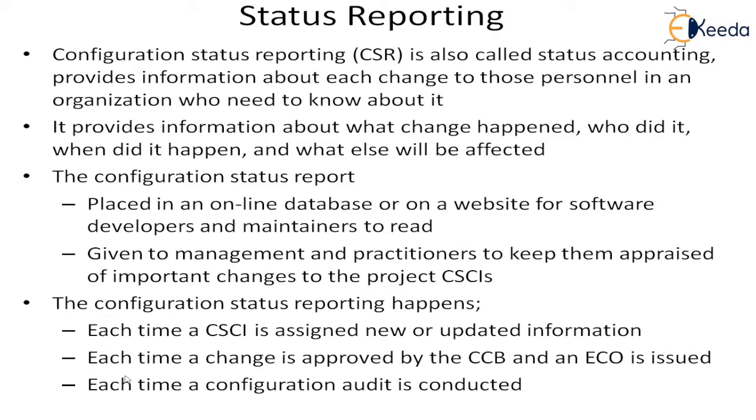The configuration status reporting happens, at what time does it happen, what is the frequency? Each time a configurable item is assigned new or updated information. Each time a change is approved by the CCB and an ECO is issued.